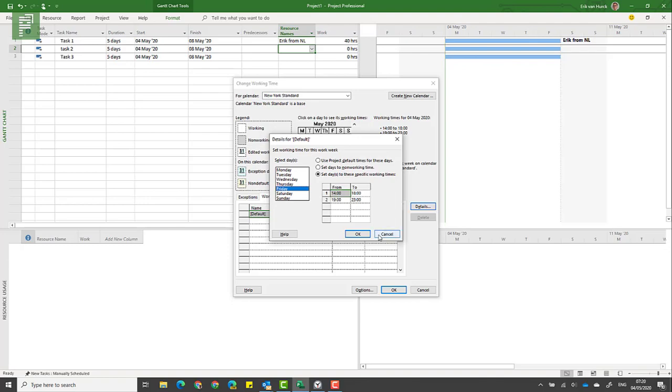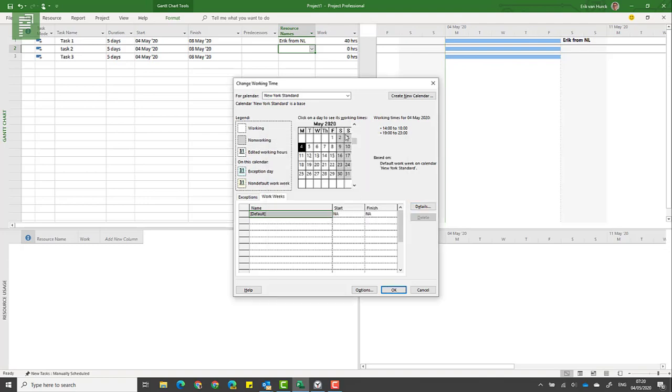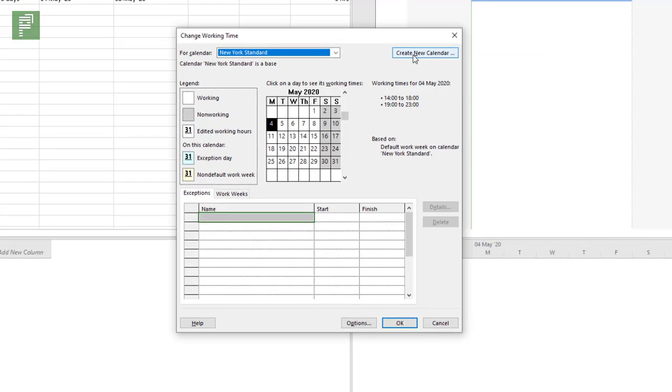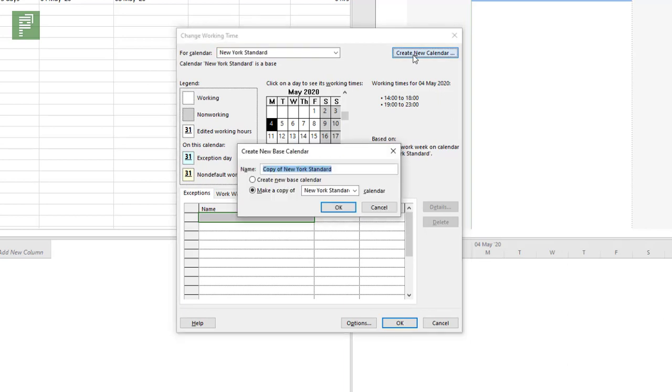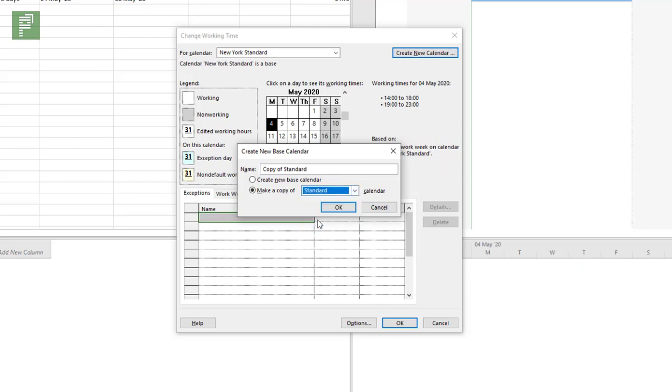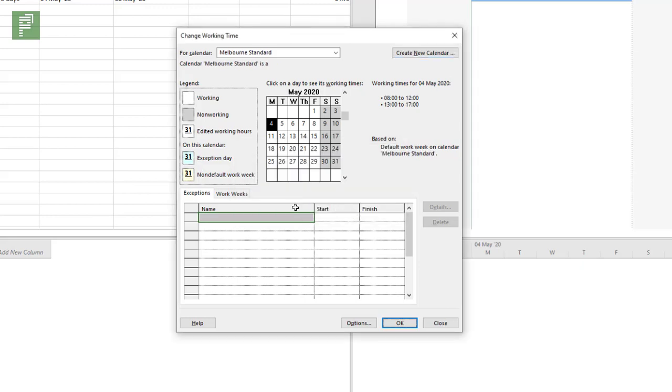Now how would I create this for Melbourne? You create a new calendar and make sure to have this as a copy of the standard before you change the name because it will overwrite. So this is going to be the Melbourne Standard.